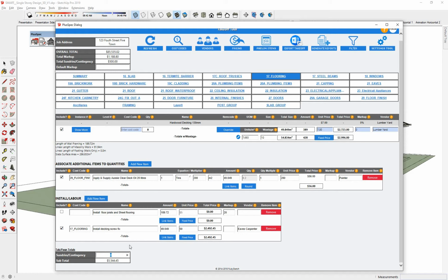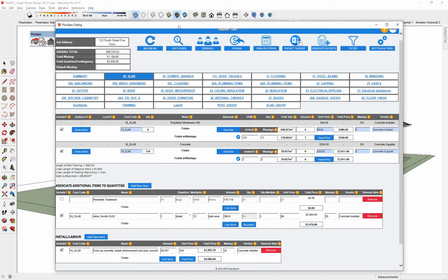But you might think, well, it's a little bit difficult, and put in some contingency for yourself. And whatever that might be, it might be a difficult site, I'll put in $5,000 there, and you'll notice that it's accounting contingency according to the project. There are some other things that are important for you to see as well.